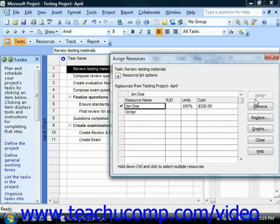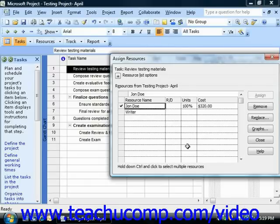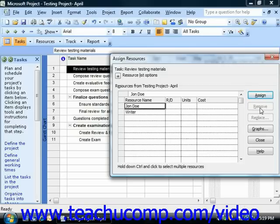Once you click the Assign button, you will see the units and cost for the task assignment shown for the selected resources in the Assign Resources dialog box. You may also see an RD column if using Microsoft Project Professional. This column is related to setting a priority for resource assignments if using Microsoft Project Server with the Resource Substitution column. Note that you can also remove work resources in this dialog box — just click on the resource's name to select it and then click the Remove button. This will also impact the units and cost shown.